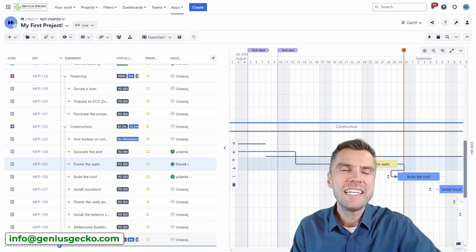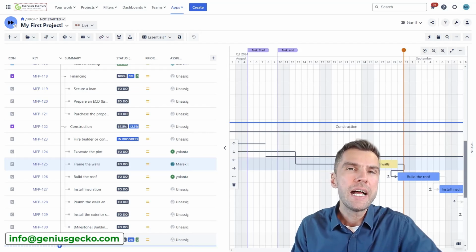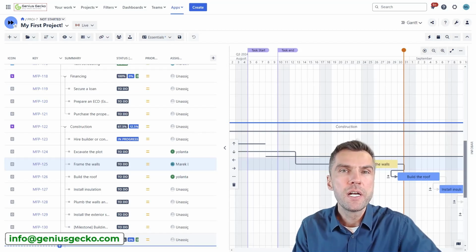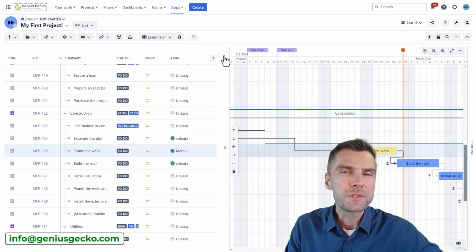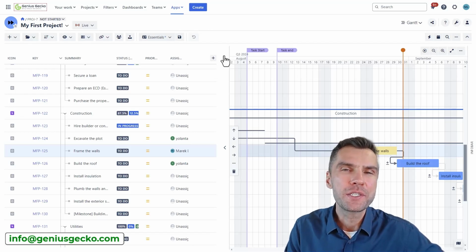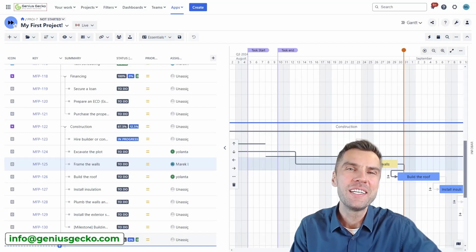So as you can see, it is very important to be aware of the risks associated with the use of the auto scheduling, especially since the same action in the previous version of BigPicture would result in a different outcome, meaning that the task scheduled on the absence days would not be automatically rescheduled. So make sure to include it in your training before you decide to update your production to the latest version. I was using version 8.40.